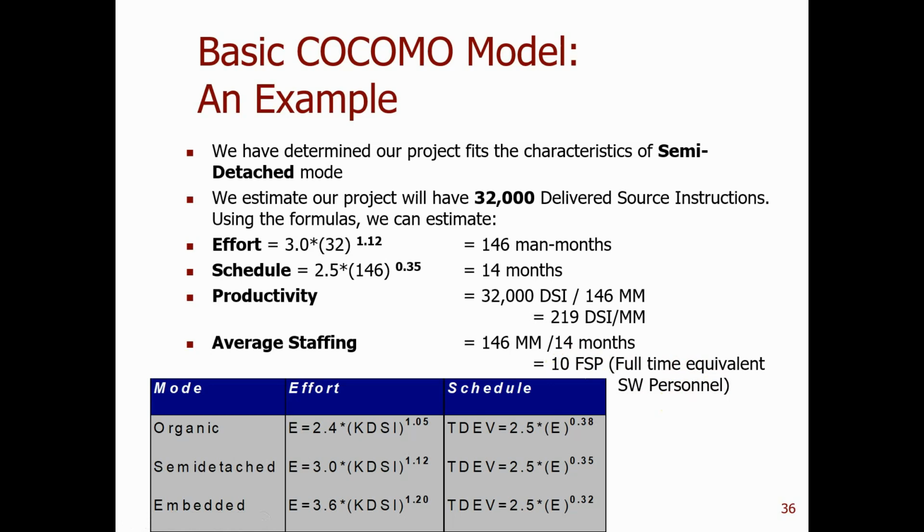From here you see why the COCOMO model is popular: it gives you a set of information, not just the effort. It also gives you the average schedule, the average productivity, and how big your team is. It contains a lot of information, so that's why the COCOMO model is popular. People use it as a benchmark, not just for estimation, but also to organize your team.